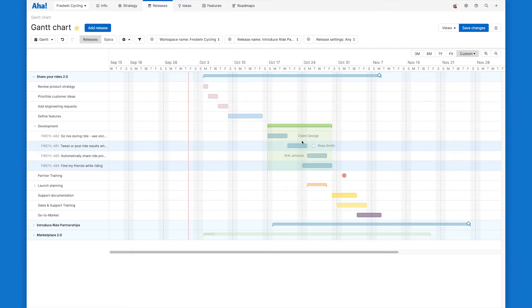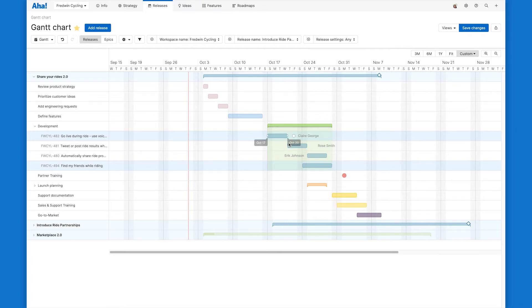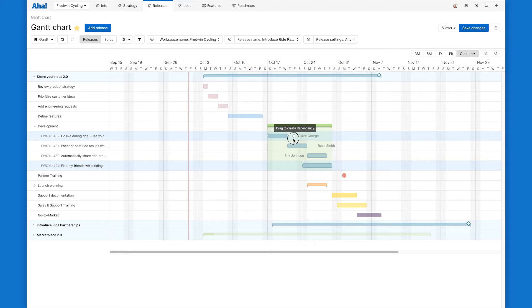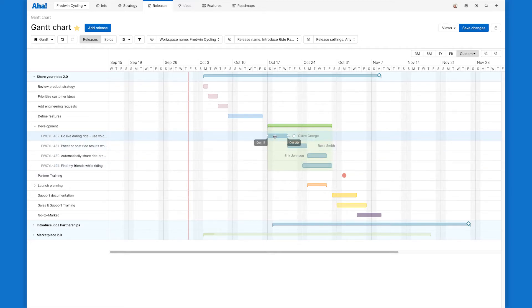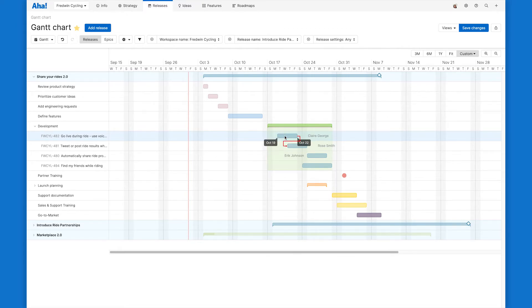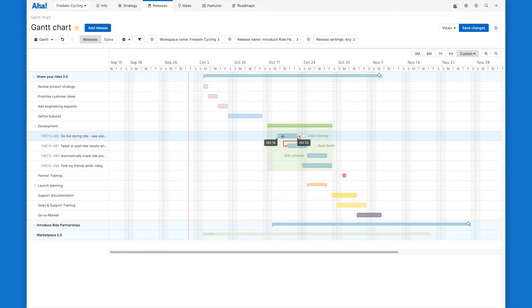So the engineering team told me that this feature here has to finish before they can start working on the next one. I'll just click and drag this dot to create that dependency line. Now watch what happens when the dates on this feature start to slip. That dependency line turns red, which gives me a really clear visual cue that there's going to be some larger impact to this delay, and we probably need to account for it.